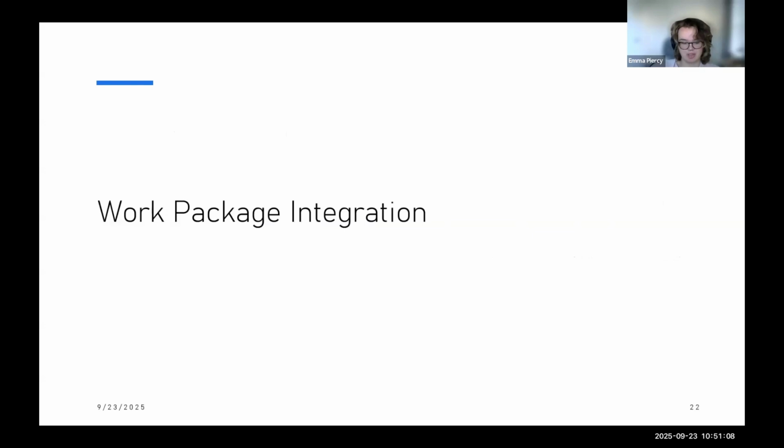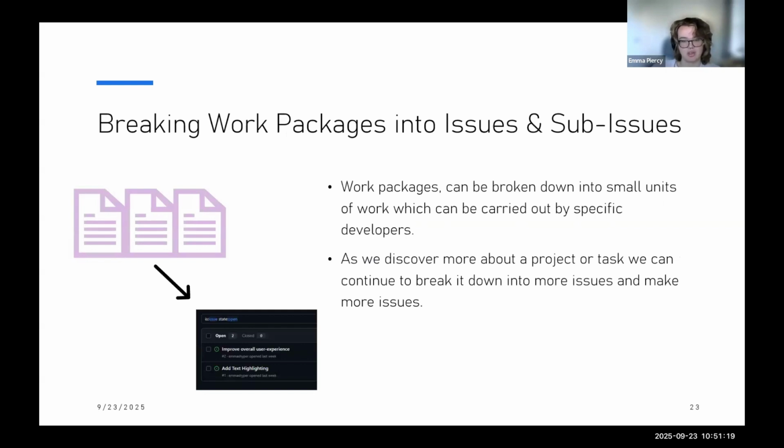So let's again bring this back to our research topic of work packages, a very common thing when we're doing research. Let's say we want to break up our work packages into issues and sub-issues, meaning that we've said we want to achieve a certain product or project or this paper, and we then need to break it down into certain issues that we can split up amongst ourselves and allocate to our team effectively. It allows for more clear communication and a clearer understanding of when deadlines are and how we can go about using them.